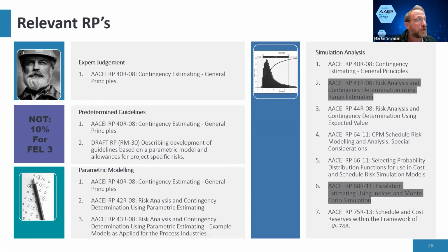We didn't really talk about it, but I just alluded to how important escalation is. There is a guideline out for that. We should do the contingency estimates on the escalation, because it needs to go back into the CapEx. Now, the one thing that I didn't get into, and I'm not going to get into now, is what people normally do: they do the contingency on the CapEx, and they calculate the schedule. Then they give it to the estimator to go and calculate the escalation, maybe some Forex exposure, and they come back.